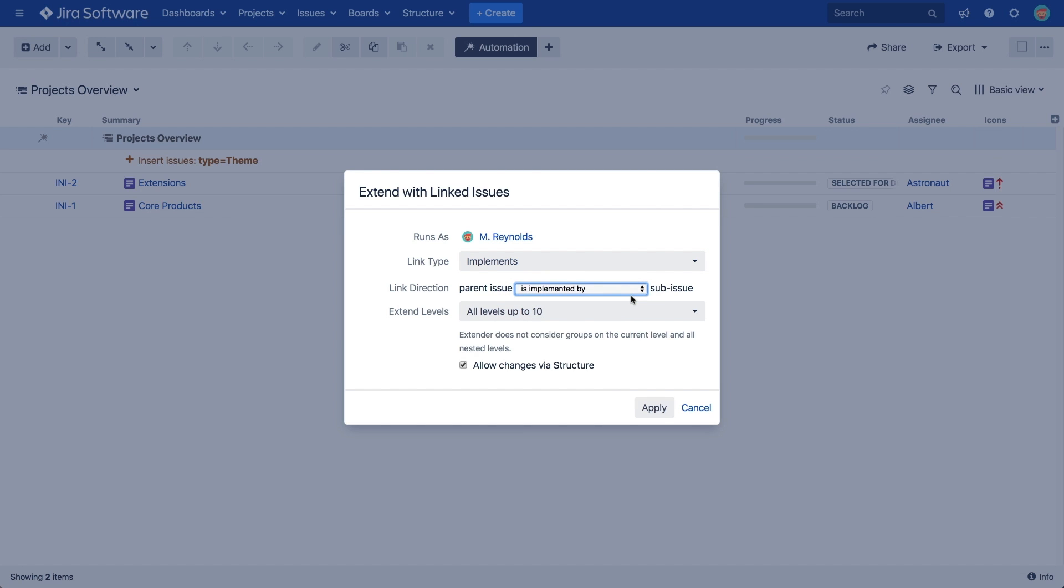Next, the Extend Levels setting allows us to set the levels of the hierarchy where the generator will run. It is a really important setting that can help you keep things better organized and also reduce performance load, especially in larger structures. By default, it is set from level 1 to 10. This means the generator will add issues linked to the first level, then add any issues linked to those at the second level, then the third, and so on, until it reaches level 10.